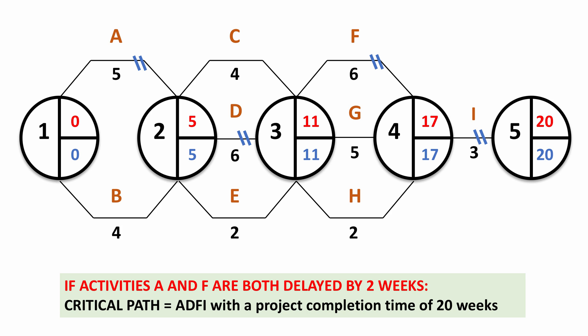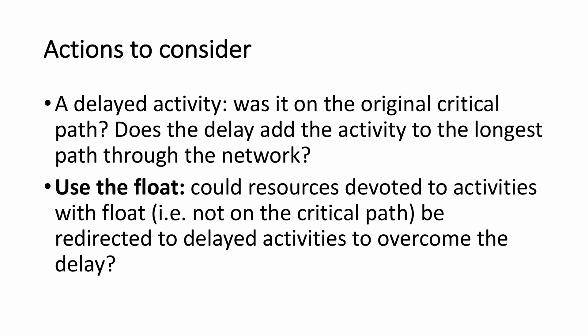So there we go. That's a typical way that the examiner might test network analysis to give you either a part or completed network, and then ask you to consider the effect on the project completion time of a delay in one or more of the activities. And the key thing is to remember and work out whether that delayed activity was on the critical path in the first place.